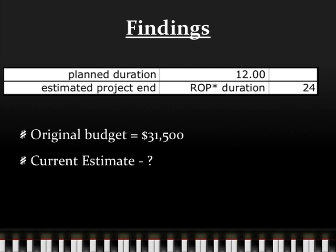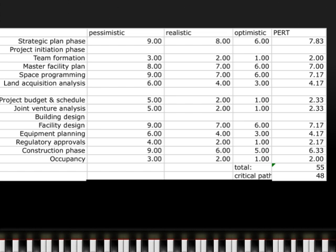In the second example, we have to estimate our own planned duration. This table shows the PERT calculations for the project. I estimated the total project duration by adding the PERT values for activities on the critical path. The estimated time is 48 months, or 4 years. PERT is calculated by taking the optimistic time, plus 4 times the realistic time, plus the pessimistic time, and that entire sum divided by 6.